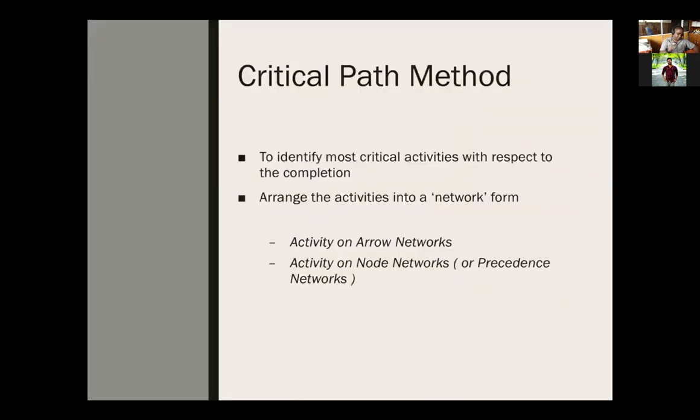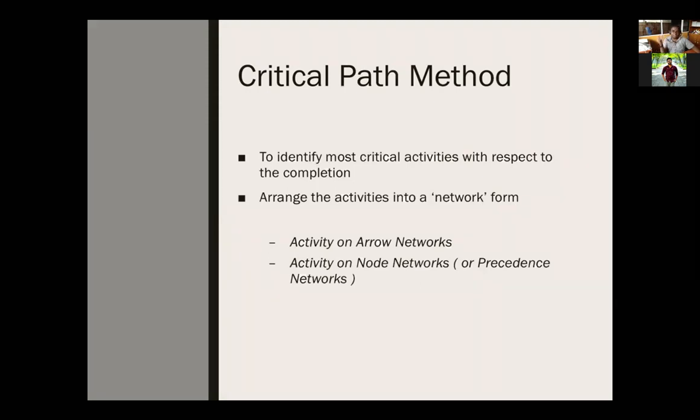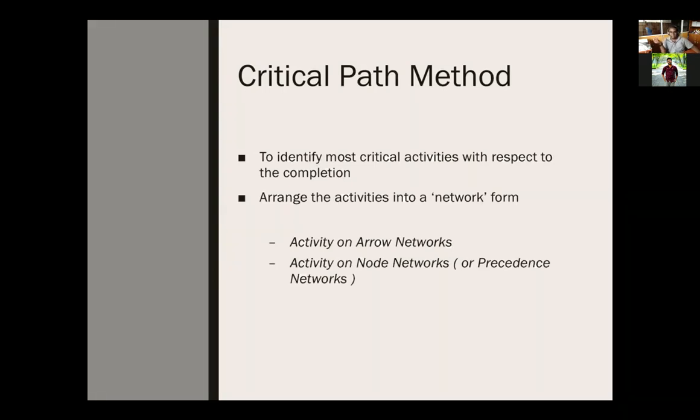Remember the data that we need. Here we call it critical path. It's one technique in critical path method. Critical path, what it is, we have discussed. Okay, in a while we will discuss again. So we have to identify the critical activities. Practically, the activities that have an effect on almost all the other activities. Let's say a two-story building, a floor slab. Without the floor slab, we can't do anything on the upper floor in a typical construction case. So that's a critical activity. Now if the slab is delayed, the entire project is going to be delayed. So we have to identify the critical activities like that. How to determine critical activities in the context of a project, we will discuss with the technique. And we develop a network.